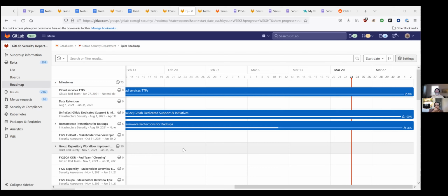Now, from the way that I was looking at this, I could use larger nestings to create that top level grouping. So if I said, these might be too granular, let's put a set of epics above this that are a little higher level that will reduce the overall total count of each of these epics. And that may start to reduce the total size of the information.